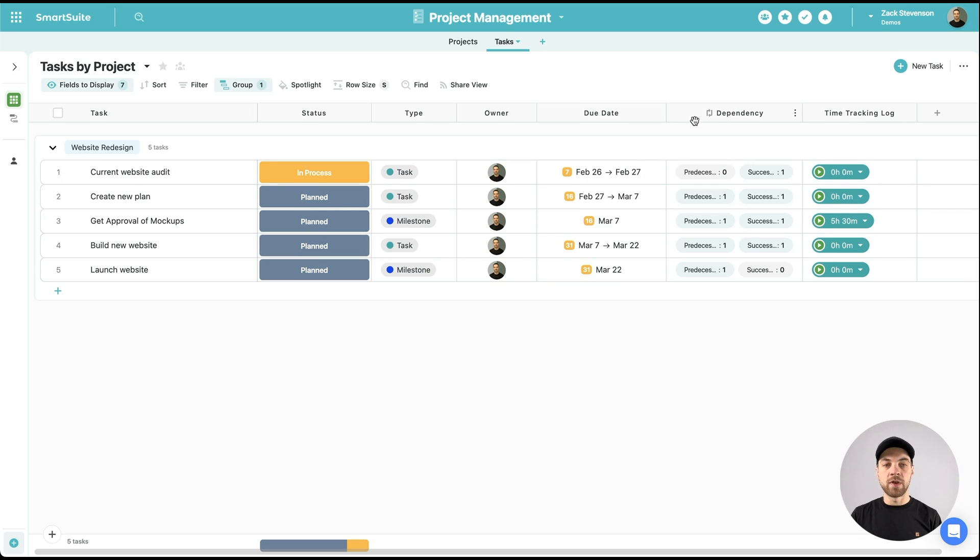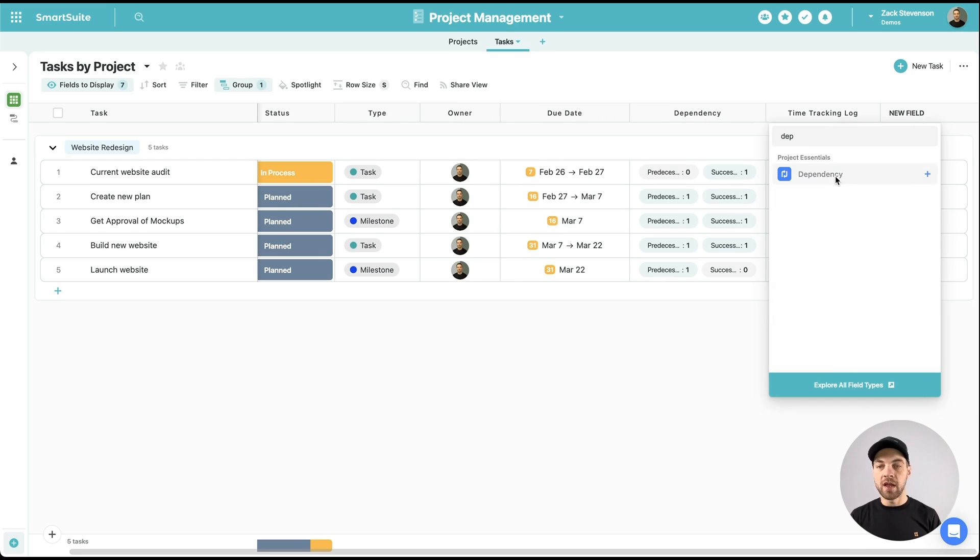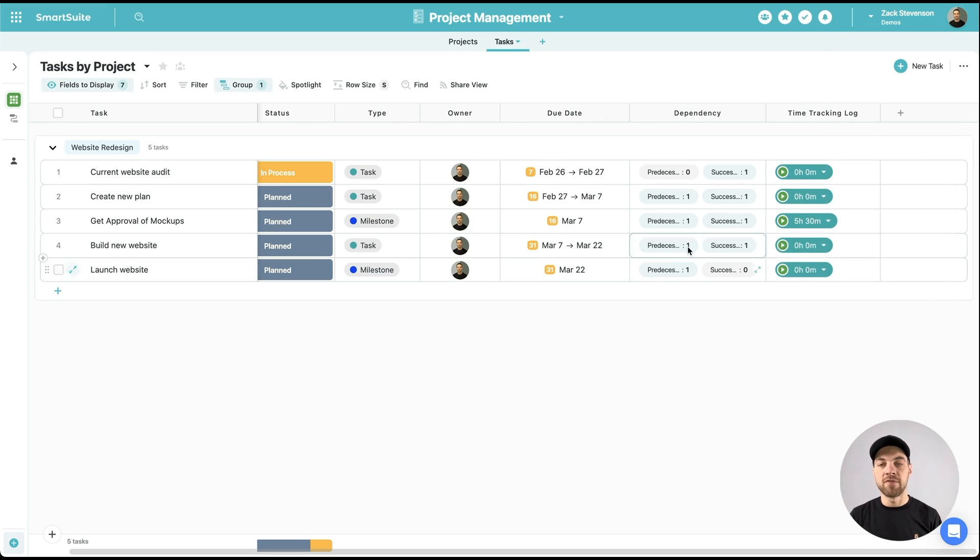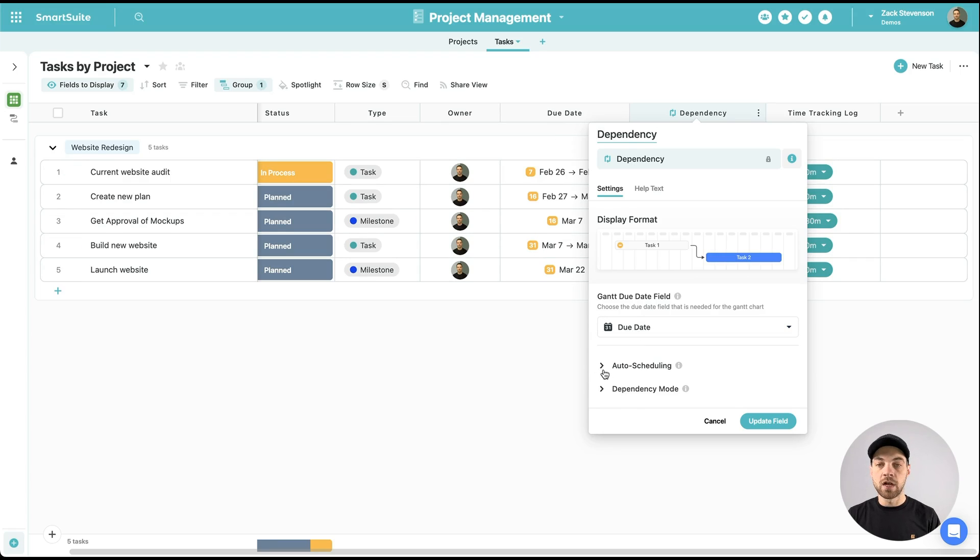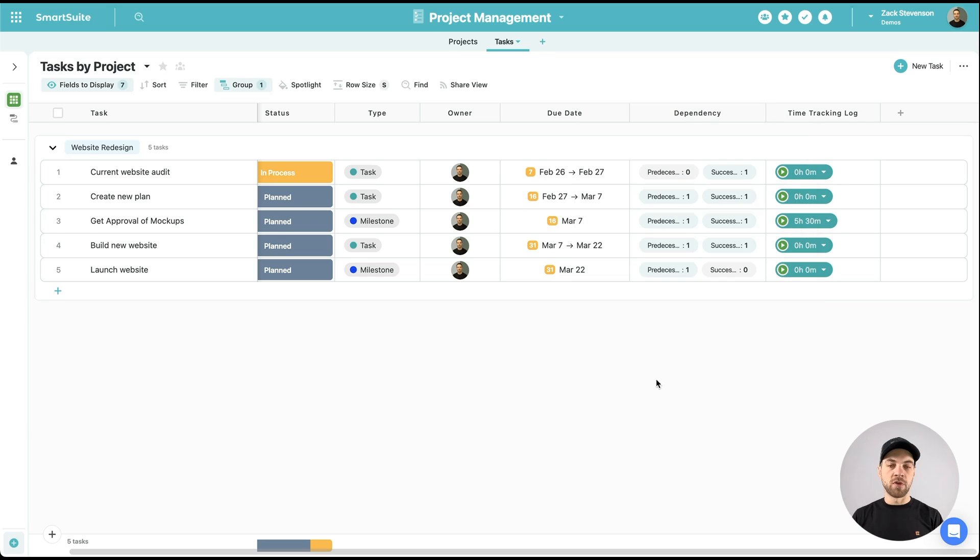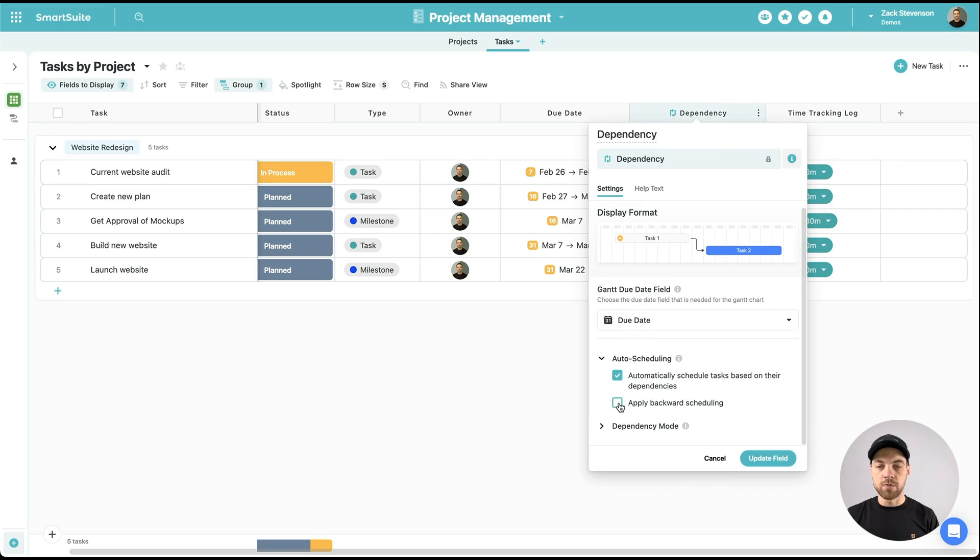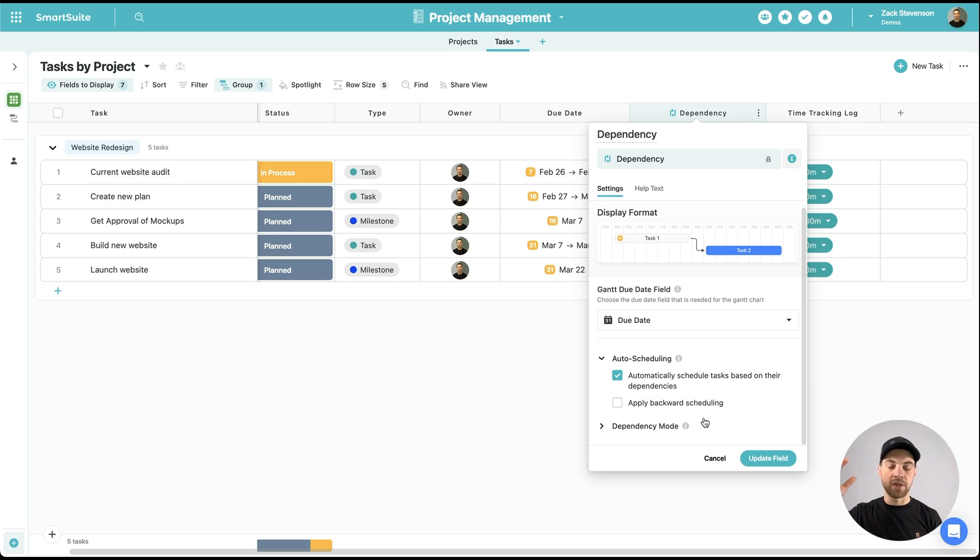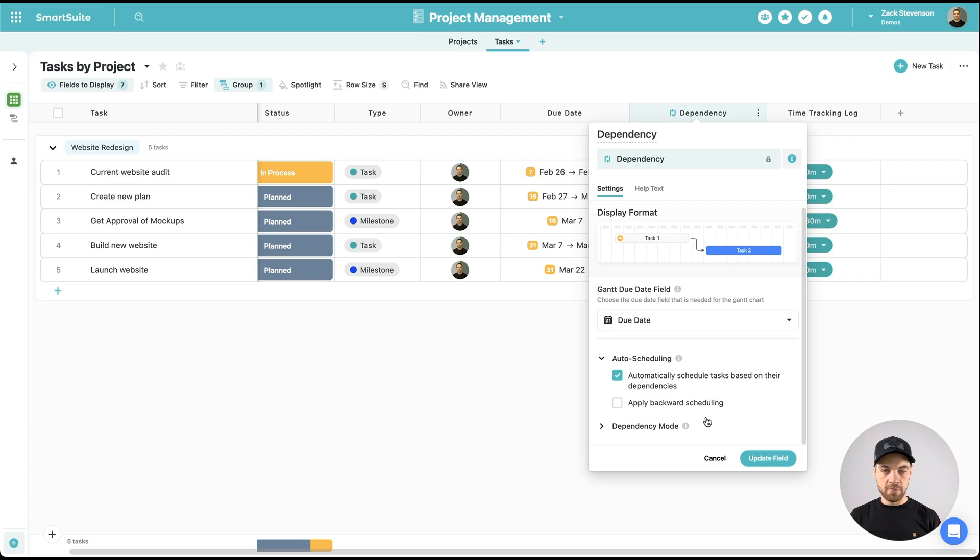Then we have a dependency field. To add that, you just go and add new field, type in dependency, and then select it, and you can add that field type. So the way that that's set up, it's going to be based off of the due date here. There's a couple of options. We've got auto-scheduling, so it will automatically schedule tasks based on their dependencies. If I change a task start date on my first task, the rest of them will move out accordingly based off of what I already have entered here. There's also apply backwards scheduling. This is where if we have a project due date and this is where we need to go live with something, then we can click this, apply backwards scheduling, and we can start from the due date and work backwards. But for this demo, I am just going to work from the start date, and then we'll eventually find our end date.